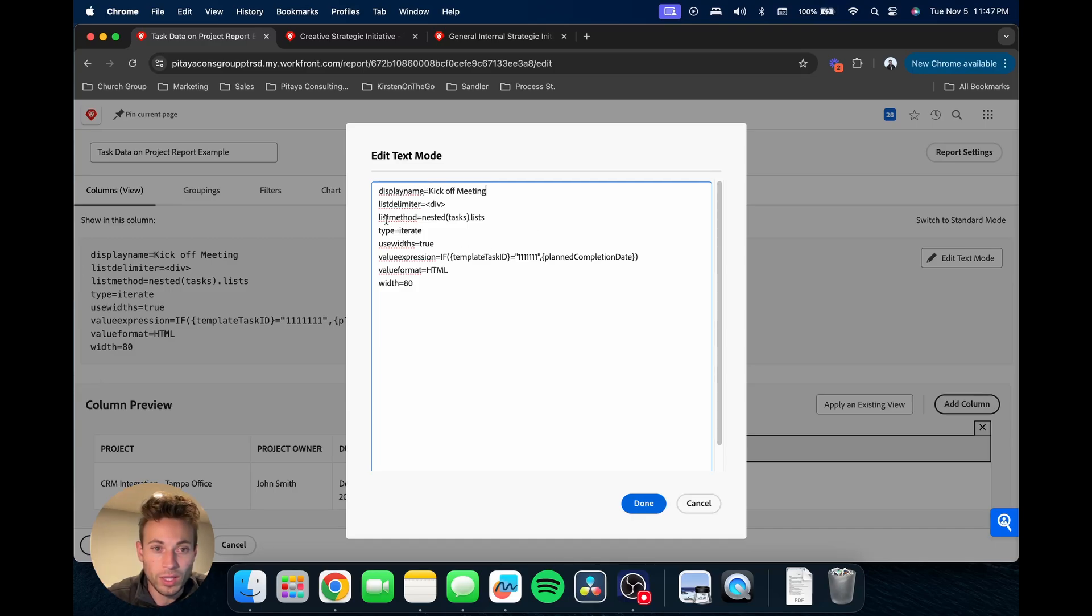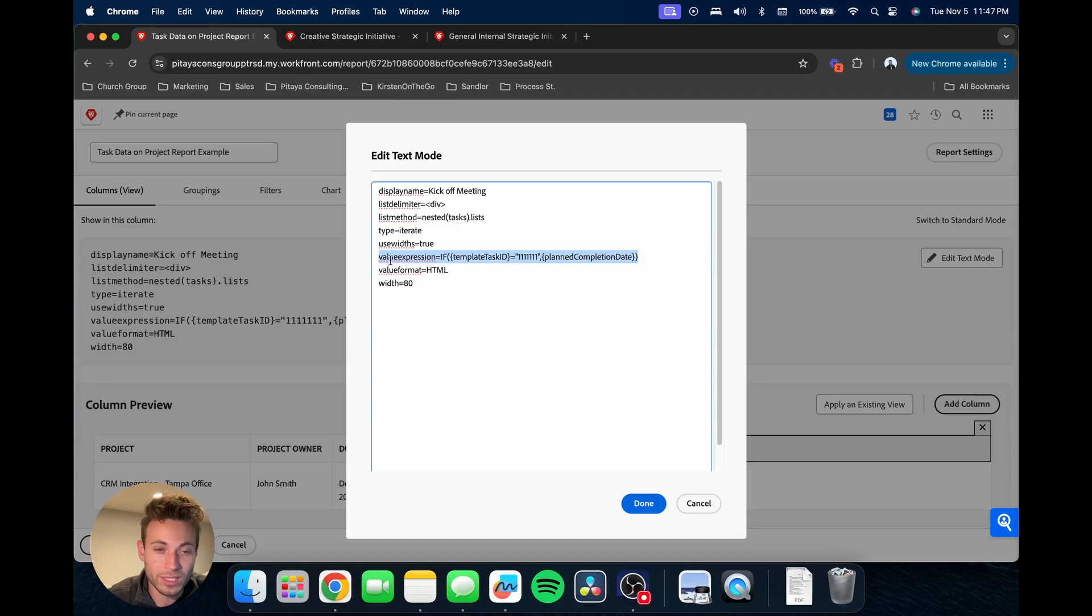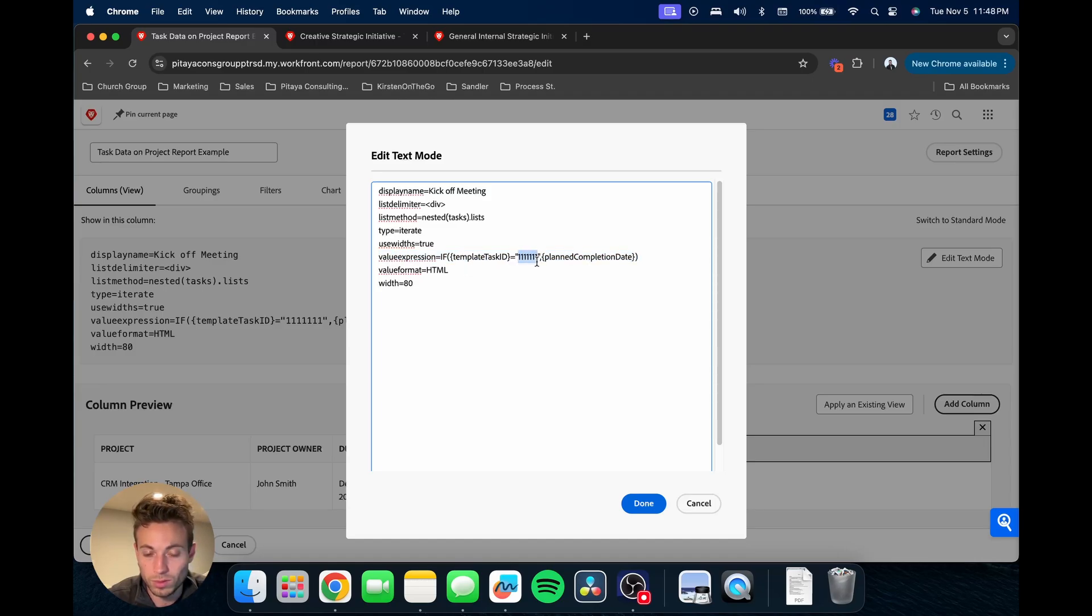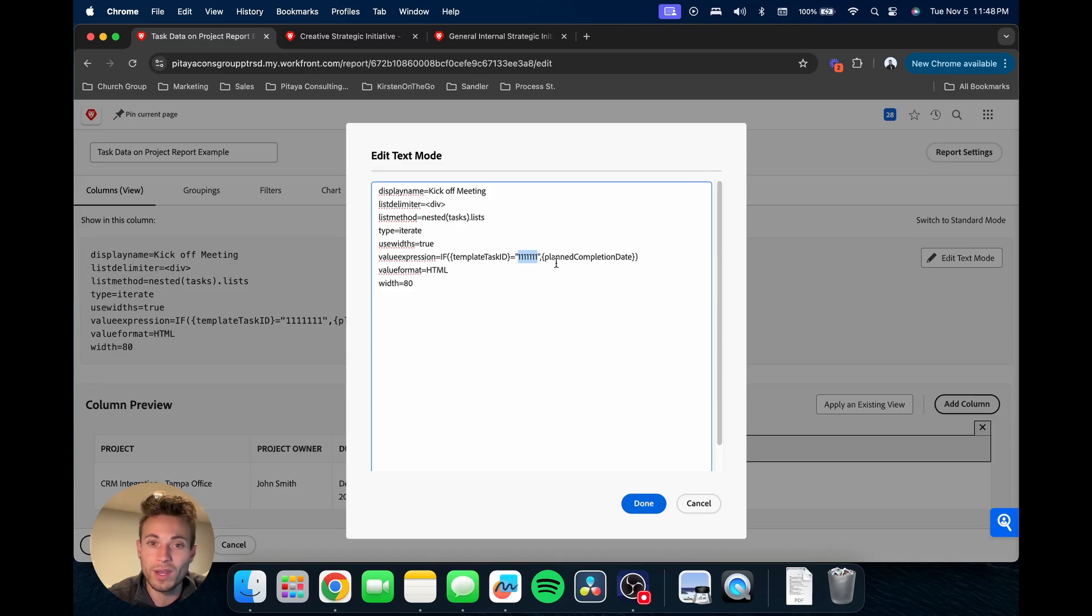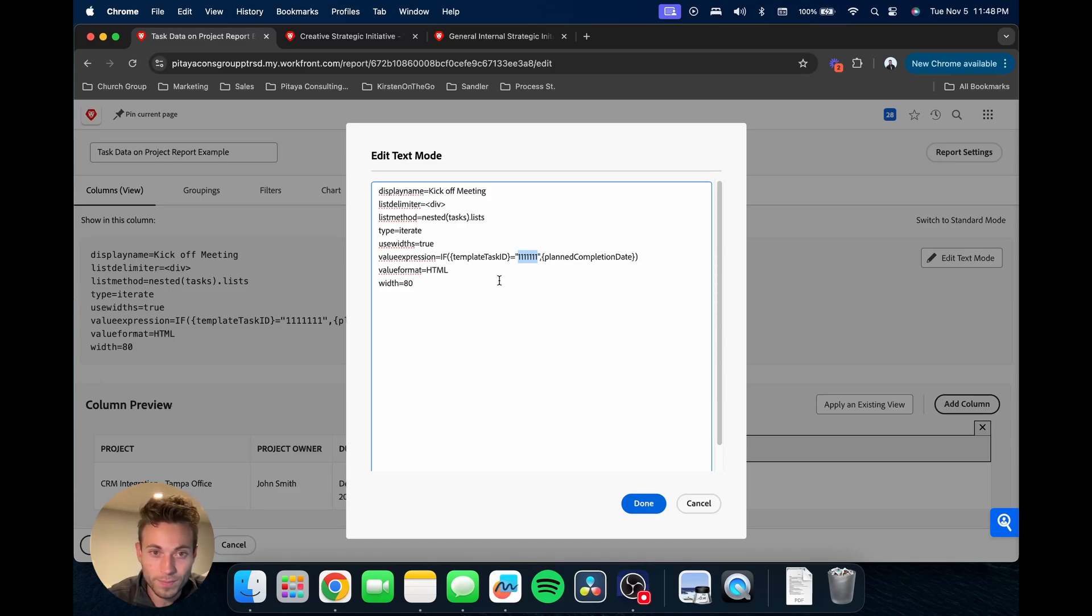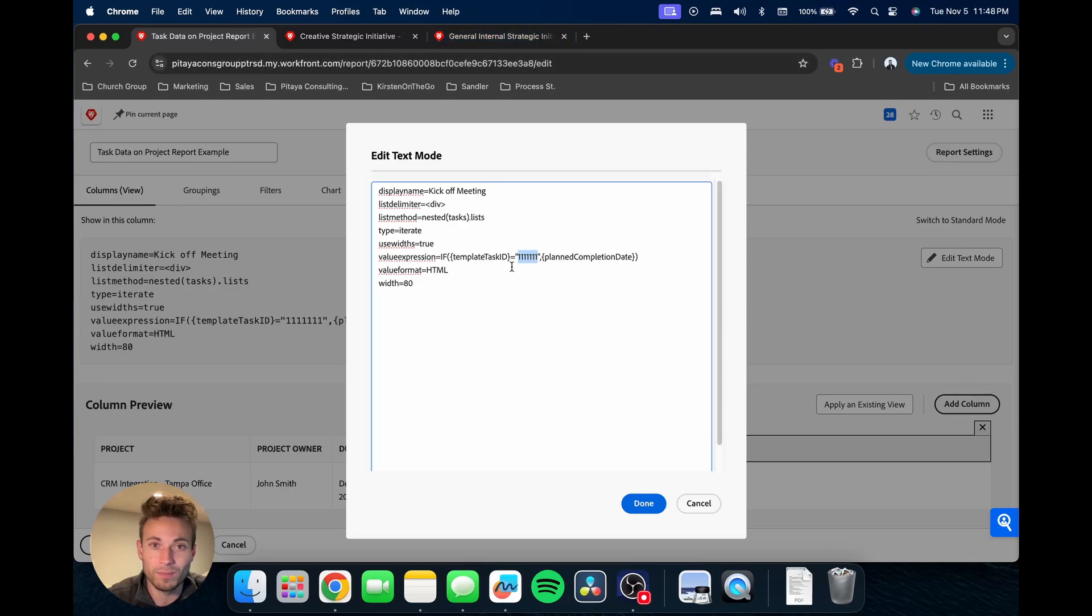The next thing we're going to look at is this value expression. Basically what this is saying is if the template task ID is equal to the template task ID, which we'll pull in just a sec, then output the planned completion date. In order to get that template task ID, probably one of the easiest ways is to just go into the template, go into the task, then up here in the URL you can copy that ID.